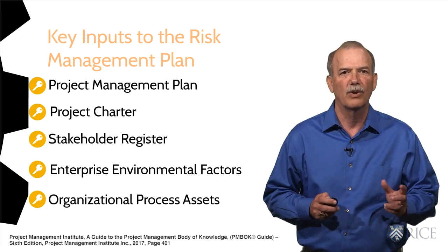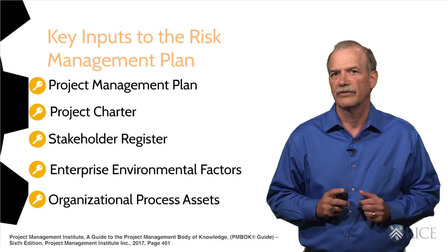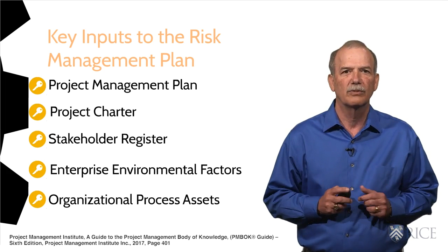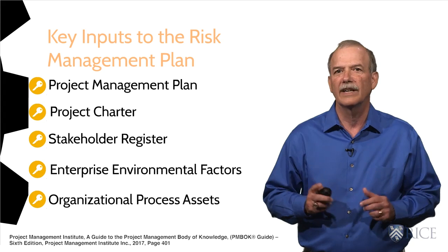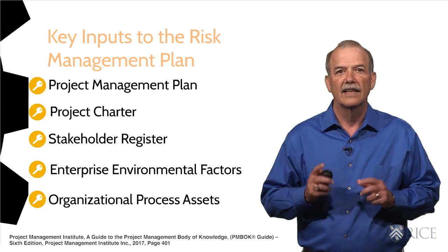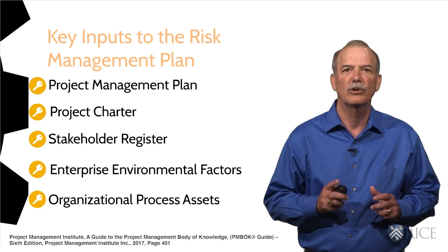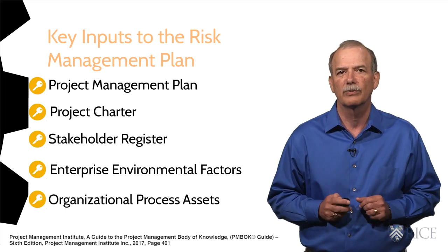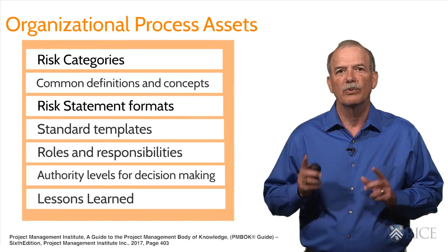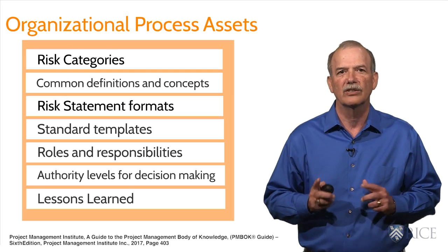environmental factors such as market conditions which might impact the project, the current legal and regulatory environment, and local issues such as security and financial stability of the region, plus any other factors outside the project itself. And finally, any information our organization might have on risk for a similar project, including their risk management philosophy, should also be included. It is important that we align our project risk management process with the organization's strategy on managing risks.